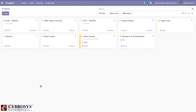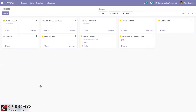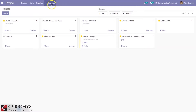In a project, invoicing can be based on order quantity or on the basis of timesheet cost of an employee. When you open the project module after installing it, you can see the created projects and the number of tasks created under the project, and we can also find an overview for the project.